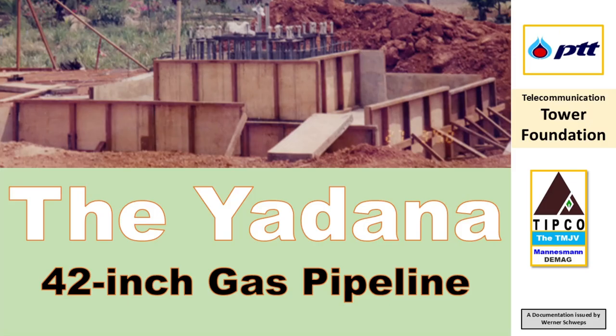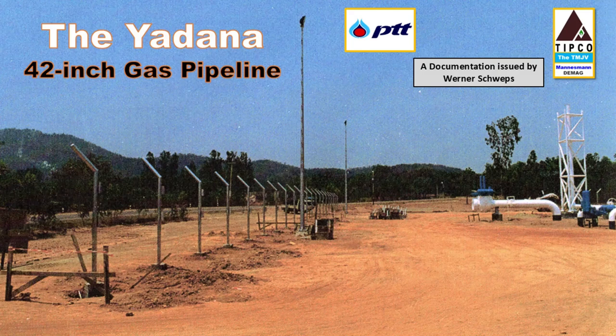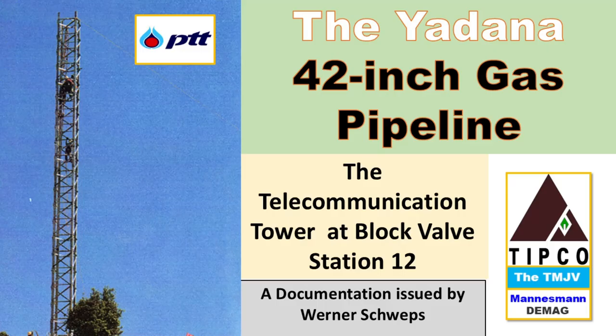This picture shows the building of the telecommunication tower foundation with its form and reinforcement steel work. The anchor bolts are well visible as well. This was followed by the installation of structural steel, which included fences, lighting poles, and the telecommunication tower erection.